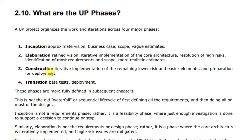The next phase is Construction — the third phase. In Construction, we do the iterative implementation of the remaining lower-risk and easier elements. We do the implementation and deployment and start to build our system.